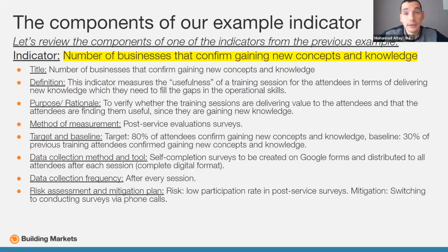I said we are interested in seeing the development in their knowledge using the pre-test and post-test method. This is my measurement tool. This is what I will use to see if this is happening or not. It's not always limited to tests or surveys. Actually, you can do something different. You can think of focused group discussions, for example. You can think of something more applicable.